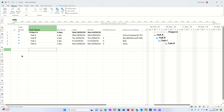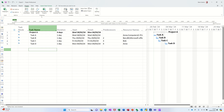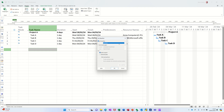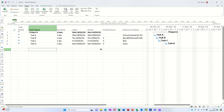So that's the planning phase done. What you now do is save the whole project as a baseline. To do that you go up to project and set the baseline. Baseline is you setting your plan — this is what you think is going to happen. You've got the option of setting up 11 baselines altogether, including the first one. You can just have one — click OK to that. And now you are ready to rock and roll.